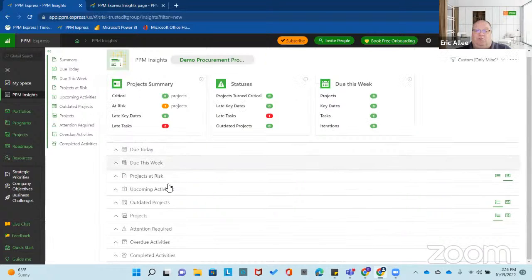But I think projects at risk is a good one. And again, the element that puts them on the projects at risk table there is something is at risk. Generally, risk, we'll talk a little bit more about this in the next couple of minutes, but risk is anything that's basically 1 day overdue. If it's critical, it's 10 days overdue. So risk is 1 to 9, and 10 days is for critical. Those are adjustable, but that's just straight out of the box.